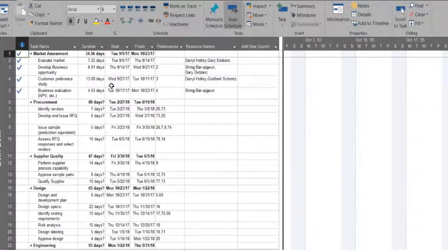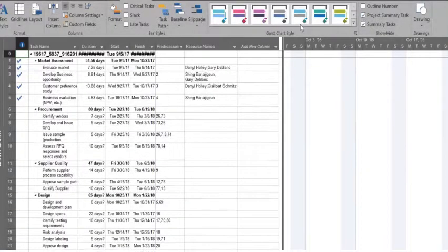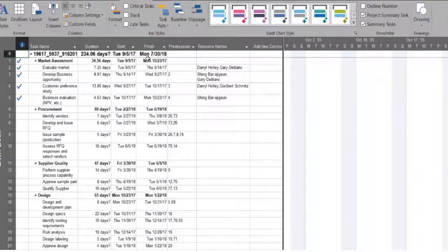Right now, after the first period, we could predict when this project would be done. All we do is click on the Format tab, which you probably didn't see, but you can see this. You click on Project Summary Task. You see how it forced down a top line here? And I'm just double clicking to read it. So if all went well here, this is Brian's. Brian would finish a little early on July 30th if he continues at the same pace.